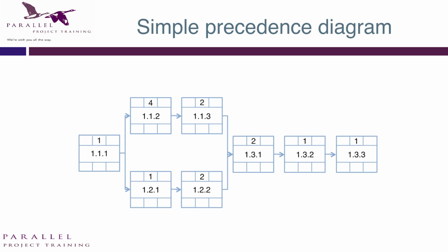So the critical path is going to be the top path. So how much float are we going to have on the bottom path? If you compare the top two activities, that's going to take us 6 weeks to do that work. Compare that to the bottom two, they're only 3 weeks. So those bottom two activities are going to have 3 weeks of float. And that float is shared amongst them. So it's not 3 weeks each, it's shared.